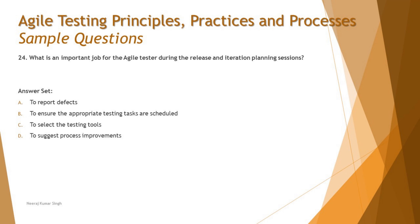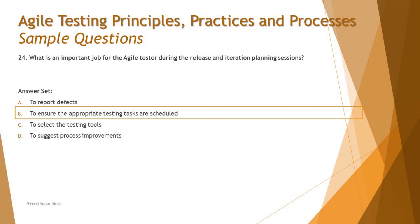Process improvement suggestions happen at the retrospective, which occurs at the end of the sprint after the process is complete — gathering lessons learned from all contributors to improve upcoming activities, processes, or projects. That is not something that happens at the planning phase. So put together, the right answer here is B — to ensure the appropriate testing tasks are scheduled with a clear timeline defined for the testing team.